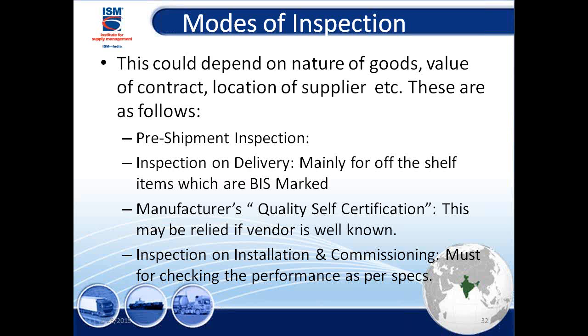Then there's another one called inspection on delivery. This is mainly for off-the-shelf items. You're buying a generator, off-the-shelf item. You're buying a UPS, off-the-shelf item. You're buying computers, off-the-shelf items. Those could be done on delivery. You don't need to do a pre-shipment inspection.